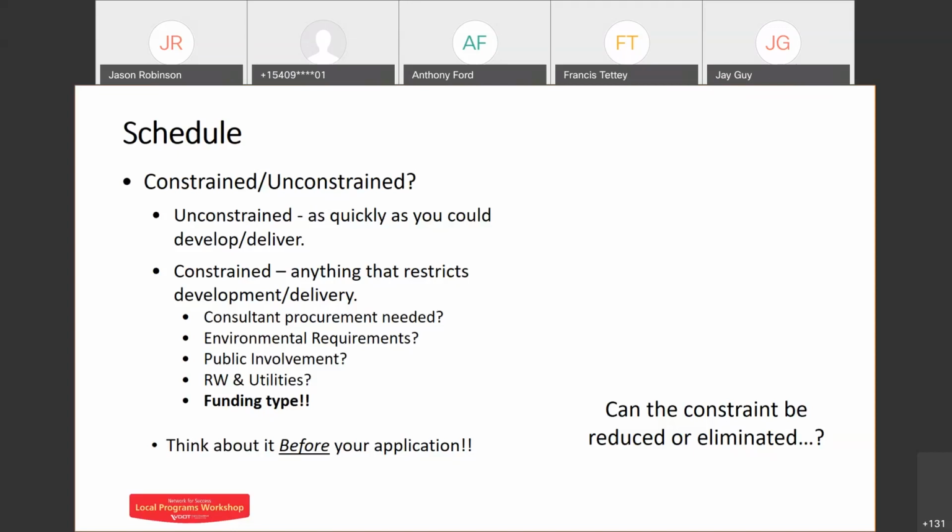And it's the same for your project. If you had a $2 million project and I stroked you a check today for $2 million, when is the soonest you could deliver it with no constraints, no roadblocks? And then when you have that number and you're looking at that schedule, start looking at it through the reality and start identifying those constraints.